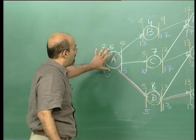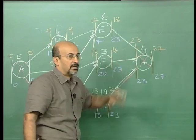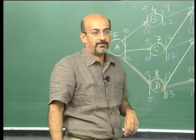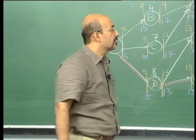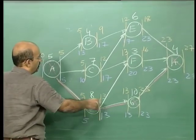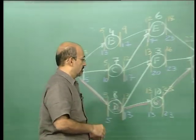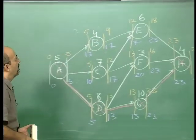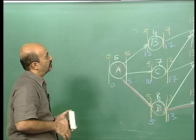Here we know that A, D, G, H are on the critical path. This is on the critical path and we have no floats on that. Let us take B. Obviously B, C, E, F have floats.